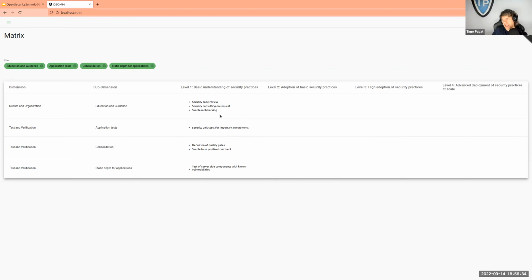Or I have different assessments for the teams. Sure, but that's what I'm saying. You might want to think about it, because you have a level of maturity, but there's another level below, which is the subtasks or sub-activities that you need to do to complete one of these. It's not that this is getting granular; in order to track it and know where you are on a weekly basis, you need that level of granularity. Either you put it here, or you put it in Jira, or somewhere else, but you will need that extra level of what we mean by this.